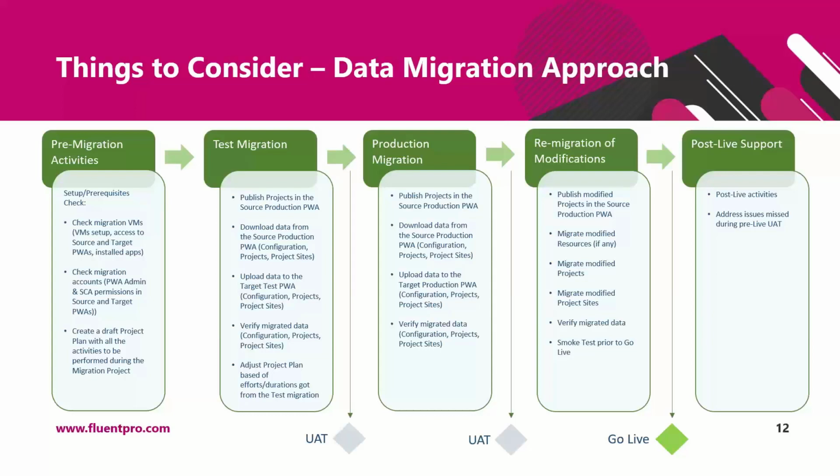And here you're going to go through all the steps of the migration project plan and identify all the issues that your data and source system might have, as well as find out the ability of your tenant to correctly process everything that you are going to put in the upload. Perform the test migration, and during this phase, carefully record the timings for every operation.